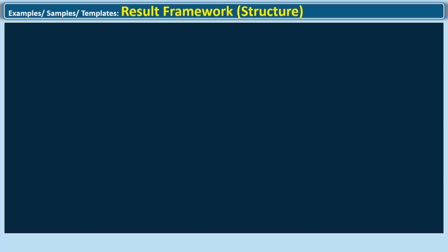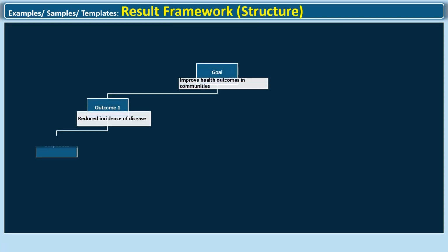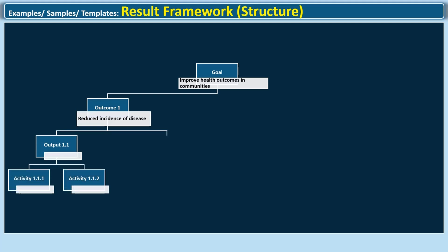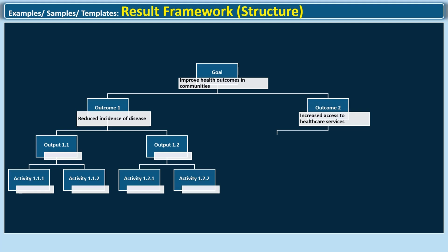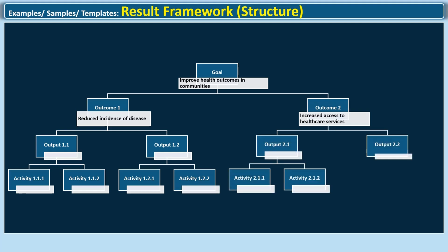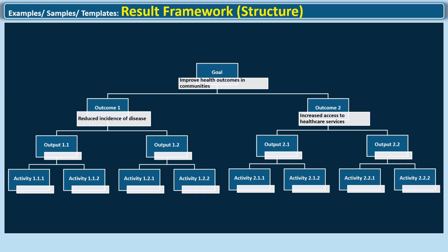As mentioned before, you will need to use this format, adding the statement and description that we discussed in previous slides for goals, then the relevant outcomes, then the outputs and relevant activities under each outcome. This is basically the result framework structure to show that how different inputs and activities will contribute to outputs and outcome and ultimately the desired goal.